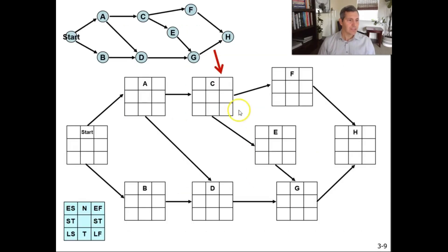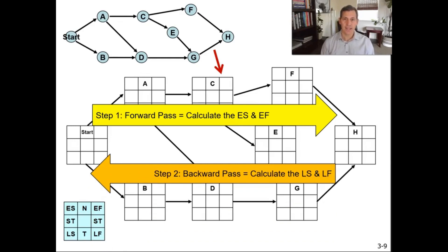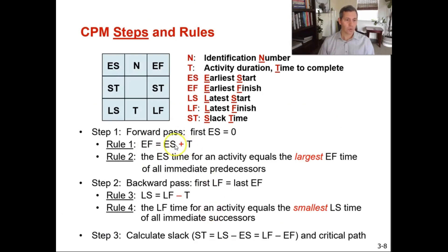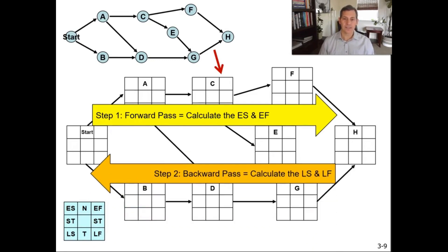Step three is to calculate the slack time: ST equals LS minus ES, or equivalently LF minus EF. If those two numbers are different, you have made an error somewhere in the process. To summarize: on the forward pass you add and look for the largest EF time; on the backward pass you subtract and take the smallest LS time. The forward pass gives you early start and early finish; the backward pass gives you latest start and latest finish. After doing all that, you calculate the slack, and that completes the AON network diagram for the critical path method.